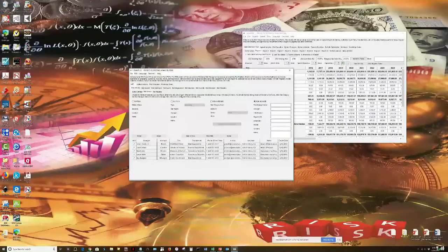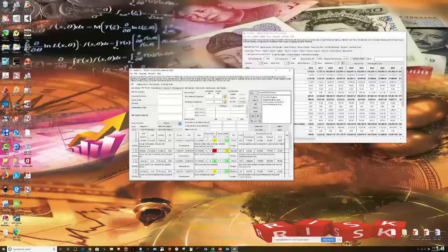And once you're done with that, we go to something that is very familiar to a lot of people, which is your risk register. You can create as many risk registers as you wish. On the top right-hand side, you see the highlighted project tab there. And you can add in as many registers as you want. These are all risk elements. So we can say, this is rework. So scope creep, continual enhancement, your client keeps asking for the same thing or keeps changing their minds. You can put diversifiable risk, residual risk, so likelihood and impact 1 to 10 or 1 to 5.